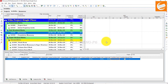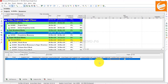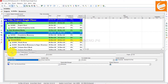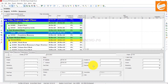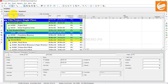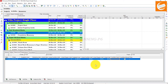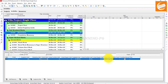Now schedule your project. After scheduling, we will update our activity status to Started, because you cannot update without starting — we must start the activity first. Go to Resources again. Now you can see the Remaining Units are 80, and Actual Units — if the Actual Units are 20.